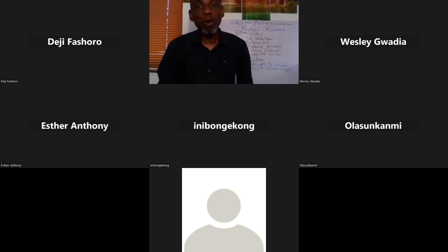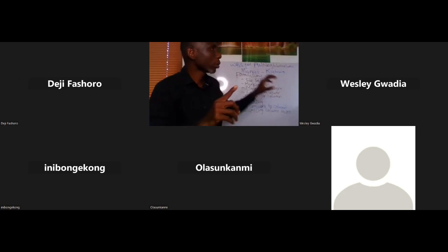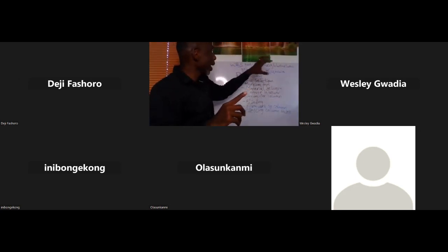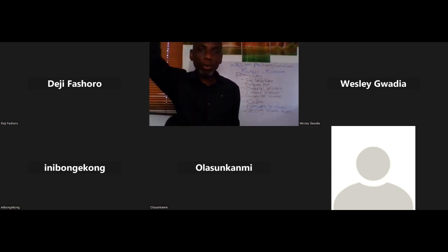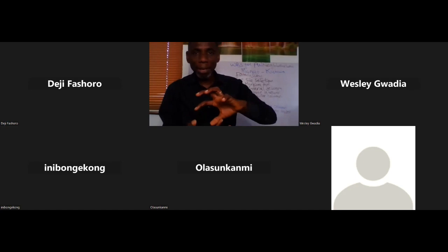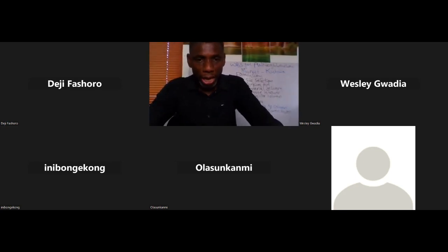So if you want to actually form a list, a scope list or a WBS list, you can first and foremost pick the work you want to do. For example, neighborhood market, and begin to ask yourself, first and foremost, what do I need to do first? Preliminary. What are the preliminary lists? You gather your team and let them list as many things as they think should be in the preliminary. When that is done, then pick up the foundation and put as many lists. Those lists, you can now begin to rearrange them, sequence them, add more, remove some, group some, and then you form your WBS. So let's go into today's class, which is on MS Projects.